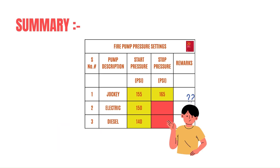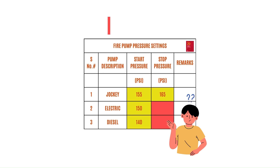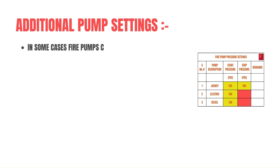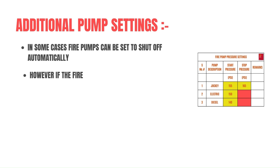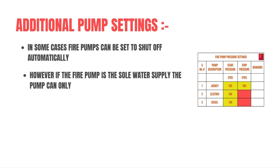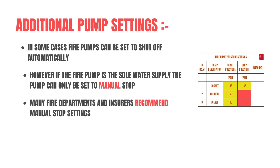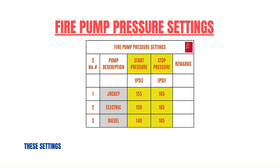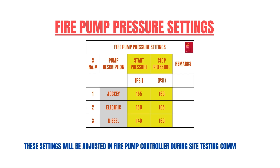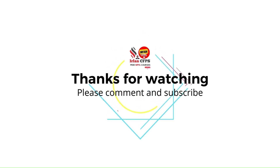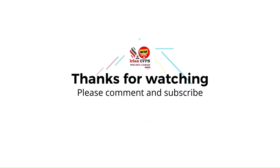This is the summary, but we also need to know additional details about the stop pressure. As per NFPA20, in some cases we can set fire pumps to shut off automatically; however, if the fire pump is the sole water supply, the pump can only be set to manual stop. Many fire departments and insurers also recommend manual stop settings. These are the ultimate pressure settings, which need to be adjusted in the fire pump controller during site testing and commissioning works.